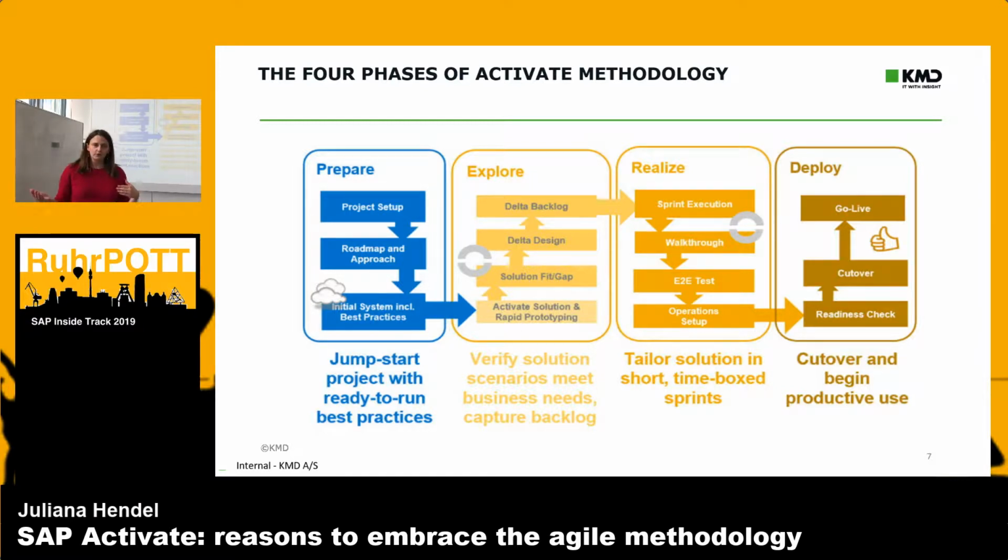We also look at our requirements, and we document every gap that we have in the solution. It is important that we constantly try to drive the business to adopt our processes. If we have a best practice that doesn't quite cover the requirement, we will always try to drive the business to adopt our process, because it's simply cheaper.